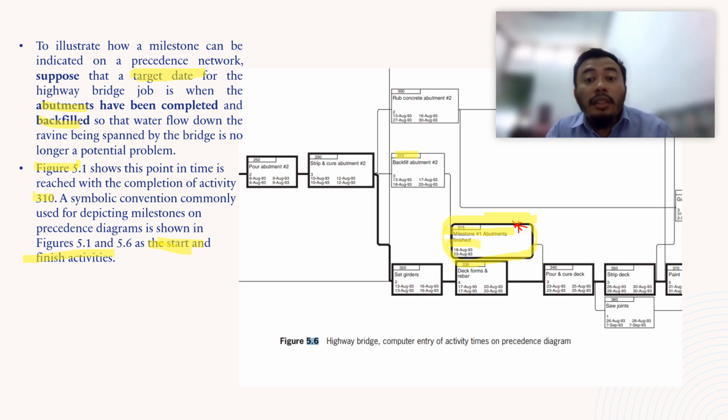That will be all on the milestone. It doesn't have any duration. So it is a one-day event, if in Microsoft Project it is also noted as that. So duration is 0. For the relationship, you don't have to enter any type of relationship or any lag.